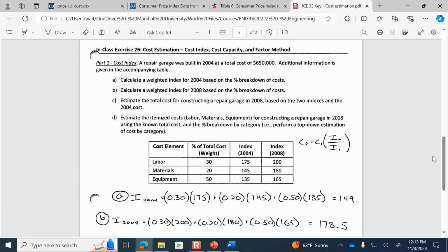So in the case of this repair garage, if the old repair garage was built on a rocky foundation that has good soil stability and good road access already, but then the new location is going to be built in a bog with really unstable soil conditions that have to be stabilized, and if there's no roads in or out of the location and those are going to have to be built as well, then it wouldn't be a good cost estimate because you'd be using dissimilar conditions to extrapolate into the future and try and predict what the cost is likely to be.